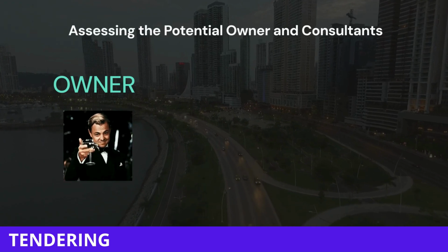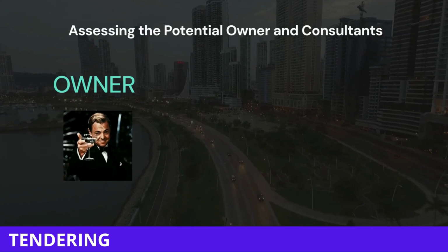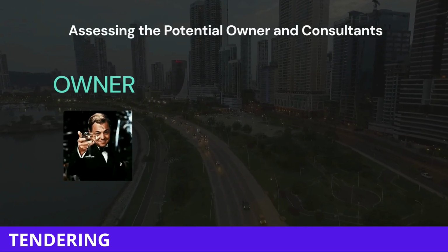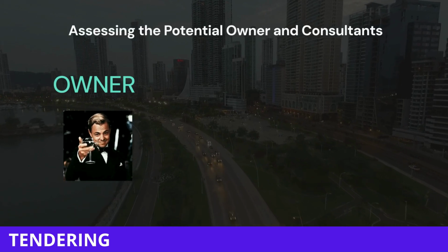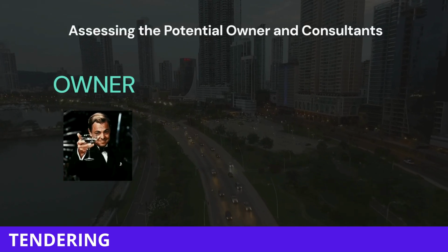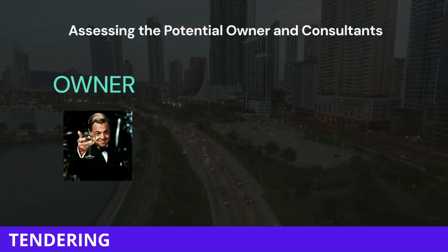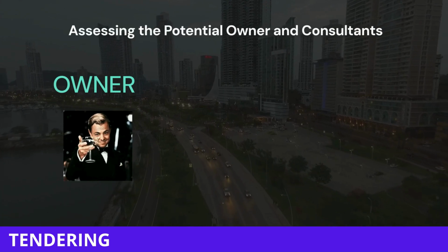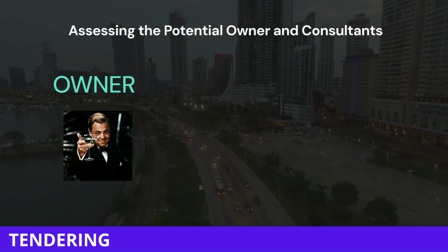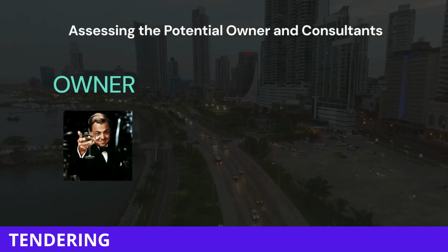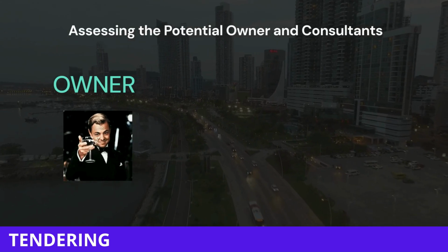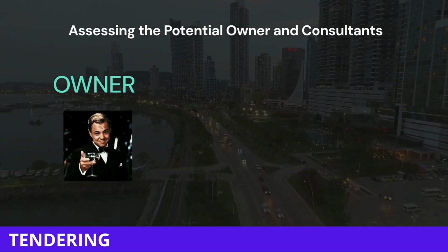If an owner has a history of disputes or is known for delayed payments, you'll want to think twice before proceeding. It's also important to evaluate their financial stability. You don't want to find out halfway through the project that the owner can't meet their financial obligations. Check their credit standing or ask for references from previous contractors who have worked with them.